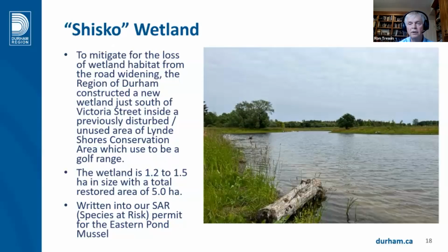Originally, we were going to share this construction with another project. However, this did not happen. This area was originally proposed as pond mussel habitat for species at risk. DFO experts did not accept this option as they didn't feel that the host fish would be able to transfer up to here. In the end, we expanded the North Pond along Victoria Street. And that was very particular for our species at risk.